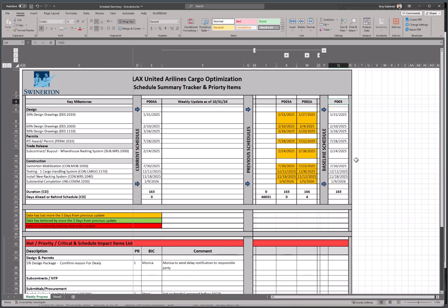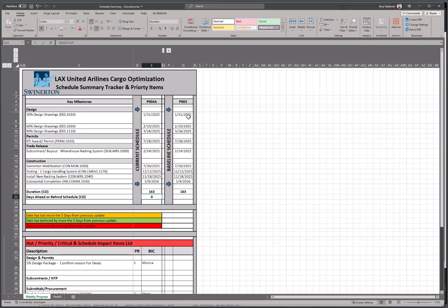So let's say P003, the owner approves it, it's a new baseline. Look at what's happening now. Look at all you're actually tracking, you're on time now, and all because we revised the baseline and they approved it. So now if I run the 1 up here, look, we're tracking every single date. So the goal also is, it's okay to have delays. Sometimes they're excusable. The owner extends the time. Just go in there and update the baseline column so your math works out and it's tracking that we're 0 days behind or ahead of schedule. That's perfect. All right, that concludes this video.